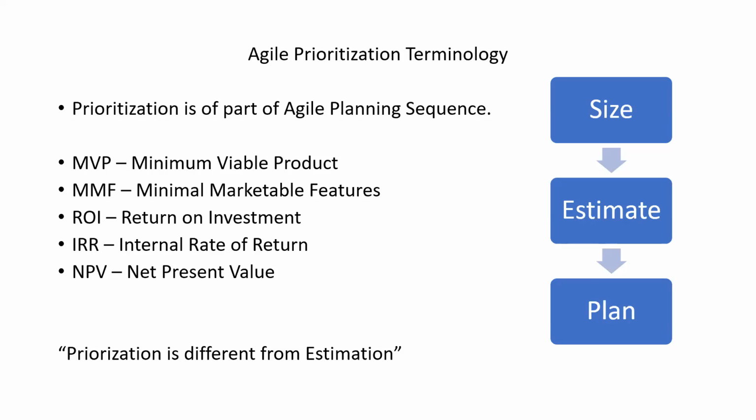Whereas prioritization is, okay, of these 5, they may have different estimation times, but what is important for me to go first? What's important for me to develop first? That prioritization comes from value-driven decision making, whereas estimation comes from effort-driven development time. So value versus effort. That's how they're different. Hope I'm clear there.